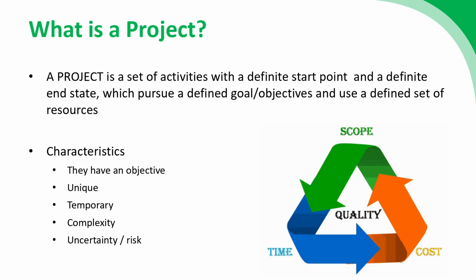So if you consider the university as an organization, teaching isn't a project. Teaching is just what the university does. It's an ongoing set of continual activities. Research isn't a project. Research, again, is an ongoing set of activities, which is really the purpose of the university. However, if we were looking to build a new campus, or to renovate our library, which we've done over the last couple of years, then this does have a start point and an end point.